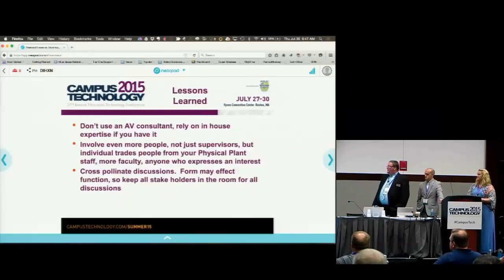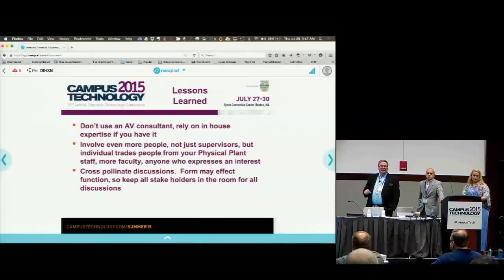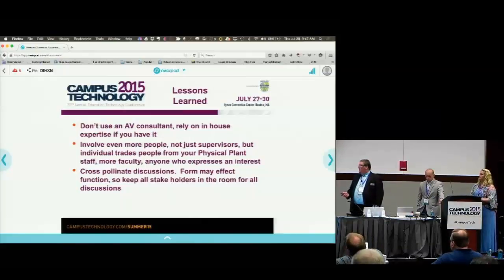Some things we learned. Don't use an AV consultant. We did. Part of it was panic by our administration of the fact that this has to happen in 10 weeks, and they needed somebody who they thought was going to ride herd on it full time. It turns out that the AV consultant actually kind of slowed the process down. They don't understand our site. Now, if you don't have the expertise in-house, that's fine. I'm not trying to disparage AV consultants, but if you have expertise in-house, your AV people and your IT people know your faculty better, can be more interactive, are there every day, and can see what's going on. So that's one we took away.